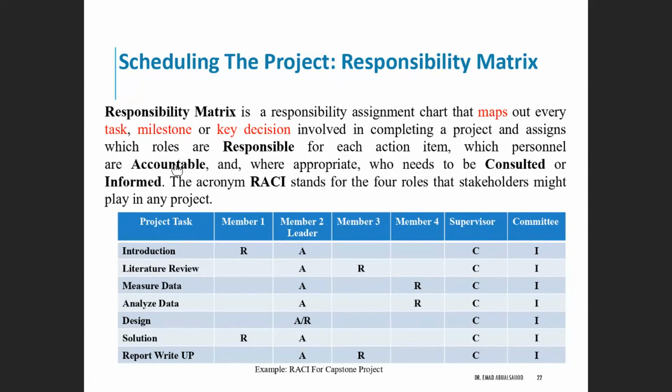of these activities. Sometimes, depending on the project level, because the project may contain sub-projects, like mega projects, which are broken down into smaller projects, you may have more than one person accountable for tasks or projects. But for a small project like a capstone, your course project, or the small projects you're working on, the team leader will be the one accountable.